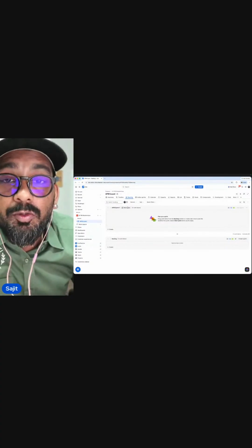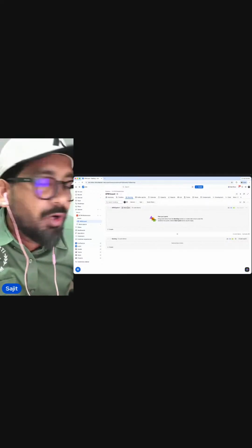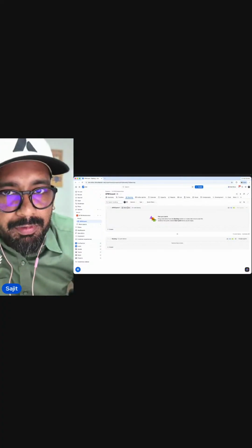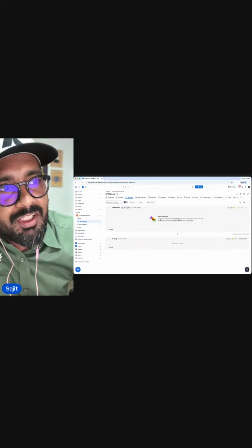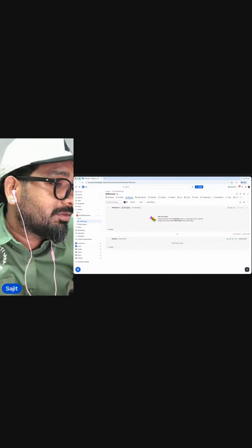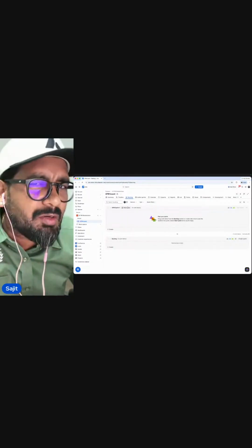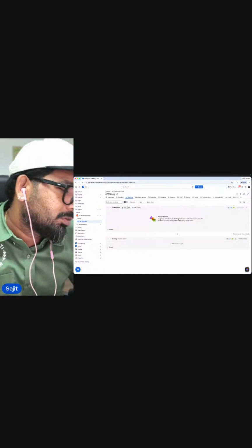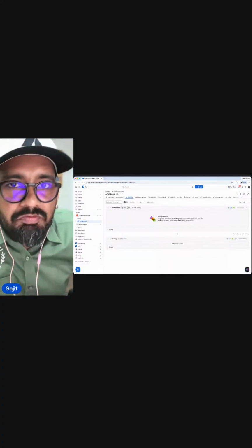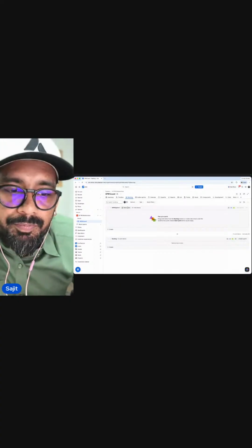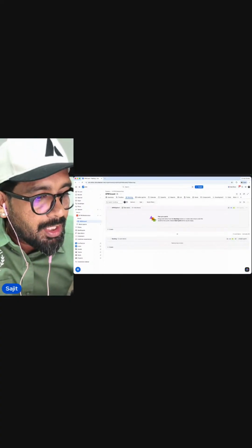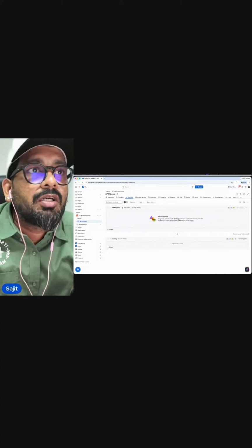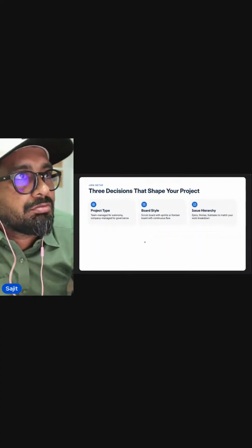Your backlog is your project's work breakdown structure, right? So if you're building a house, your backlog is every step or every task that you have in that project. What you build in, let's say, summer is your sprint, in some way, right? You can pick, okay, these are the items that I'll do in summer. Next one, what I will do in autumn, what I'll do in fall. In that manner, you can break it down. All right, let's come back a little again. Let me switch from Jira to what we were talking about around the decisions that shape our project.